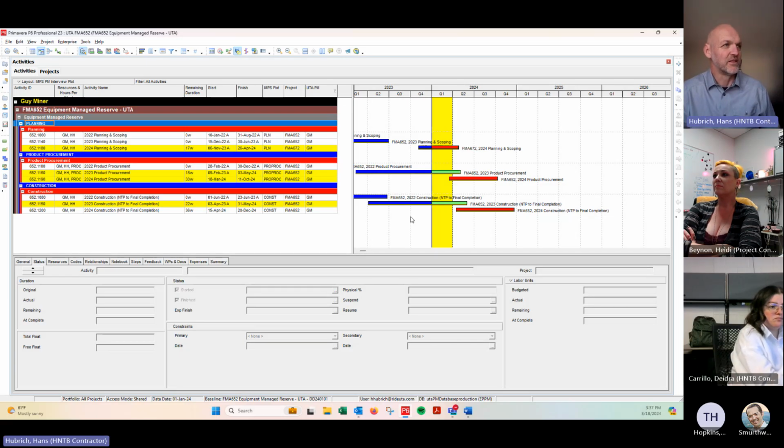So I'm going to leave this right here, and jump back down to my sandbox so I can play around in it more and not worry about messing this schedule up, and we can do some testing or mess things up if we want to. When I'm doing this, I just work in this live schedule until the update's complete. If I mess it up, I can just delete that whole project, go copy the one out of the sandbox and paste it back up above where it's supposed to be. And then I'm back to original. So I've always got a safety net to catch me.